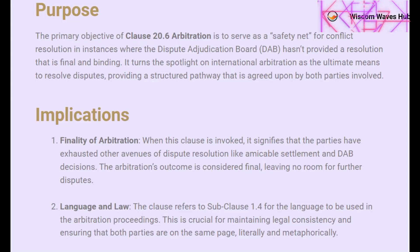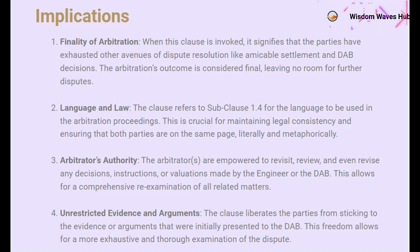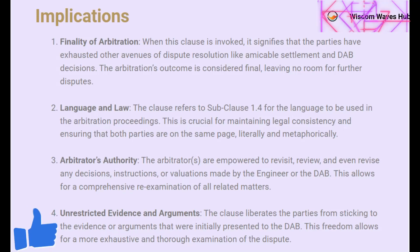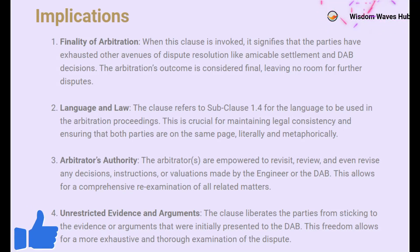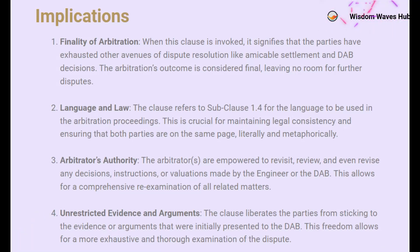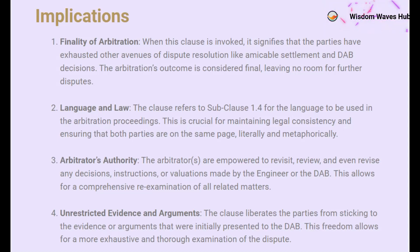Let's dive into the implications of invoking Clause 20.6. This isn't just a casual step — it's a significant move with lasting impact. Invoking this clause signifies that you've reached the end of the road in terms of dispute resolution. It means that all other avenues, such as amicable settlements and DAB decisions, have been exhausted. The outcome of the arbitration is final, closing the door on any further disputes. This level of finality can be both reassuring and daunting, so it's not a step to be taken lightly.